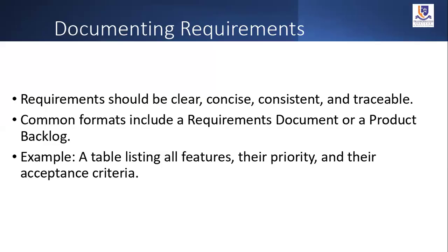They will tell you something right now, and in the course of what they told you, you get an understanding, okay, this is what they said. But as the project progresses, you get to hear, "But we didn't do this, you didn't do that," and this was not captured initially. So as a BA, it is very good to document properly, because when you document these requirements, you have something to hold on to. We don't need to work with assumptions as BAs.